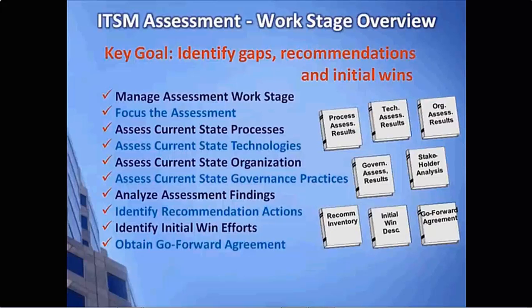Note that the scope of our assessment includes process, technology, organization, and governance practices. So we're not simply assessing processes, we're taking a look at the entire IT picture when we go through this stage. When you look at the steps that are involved with this part of the effort, notice that they align to those areas. We're going to manage this work stage, focus the assessment in terms of what areas we truly want to look at, and then we're going to assess our processes, our technologies, our organization and governance practices.